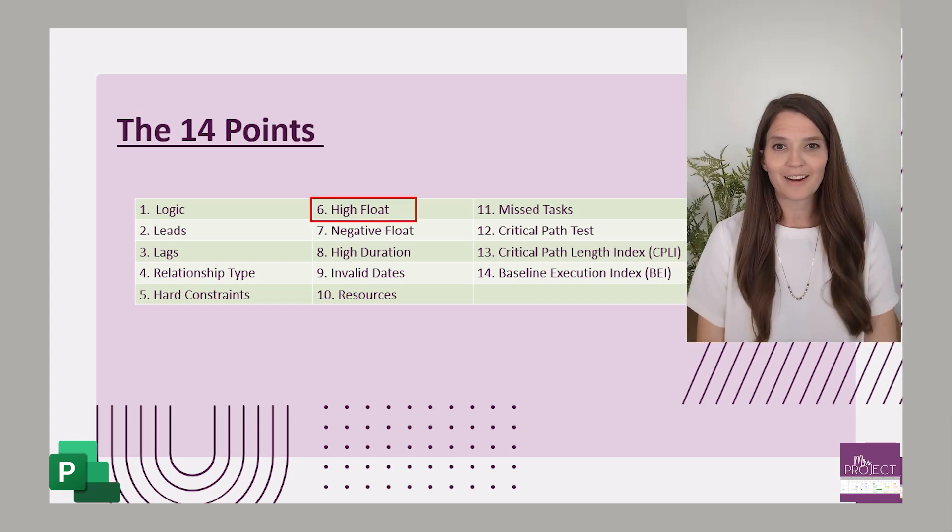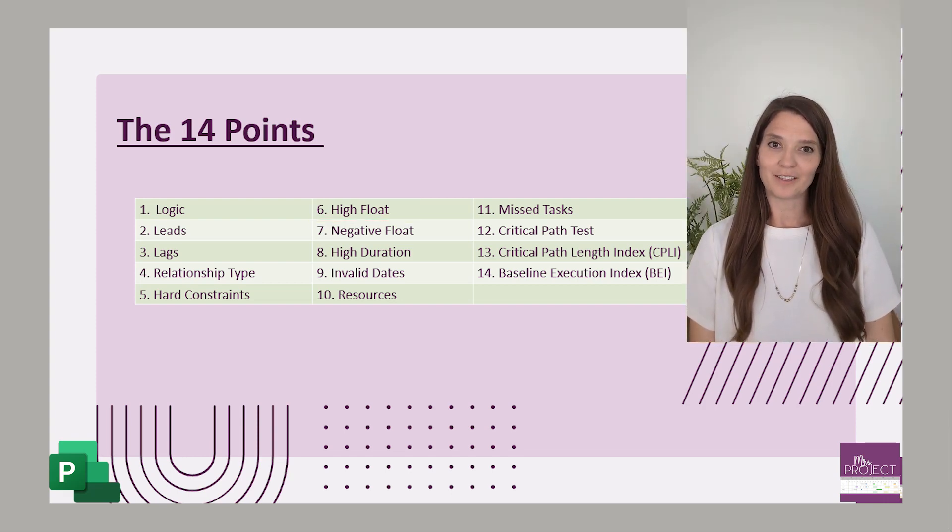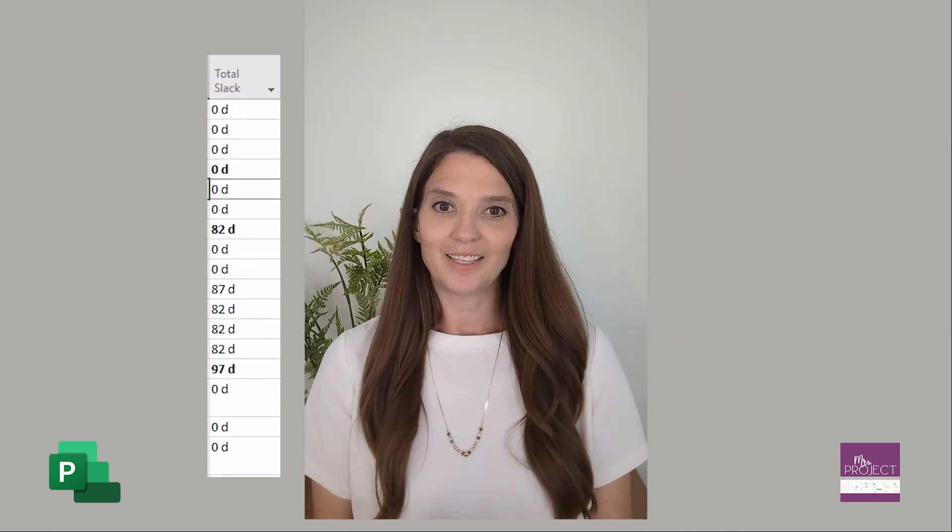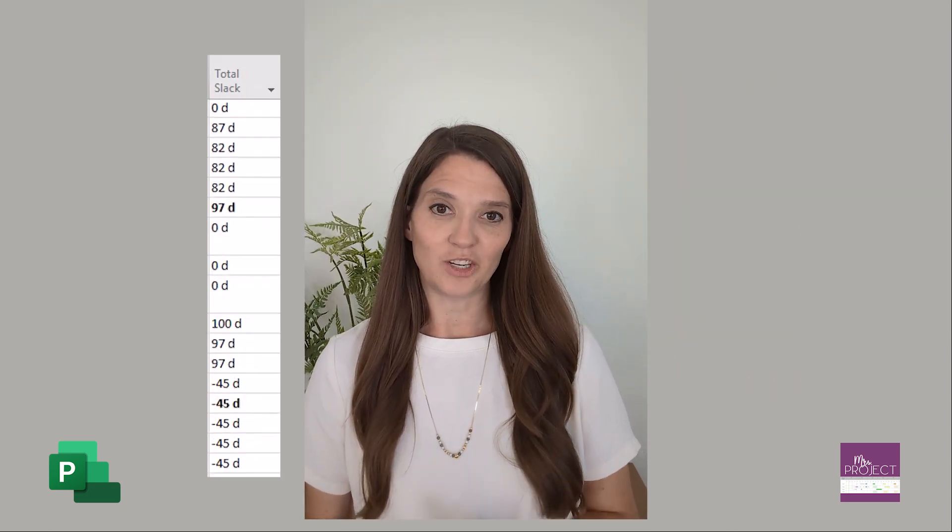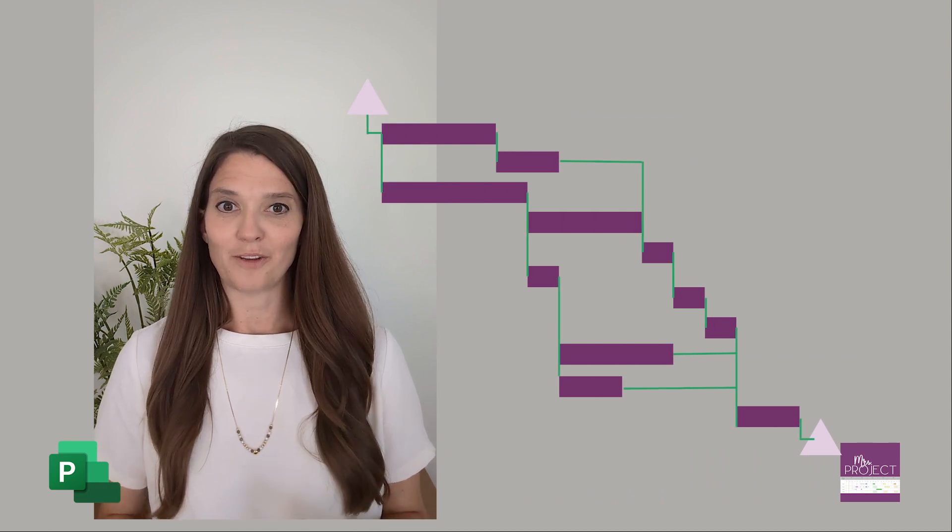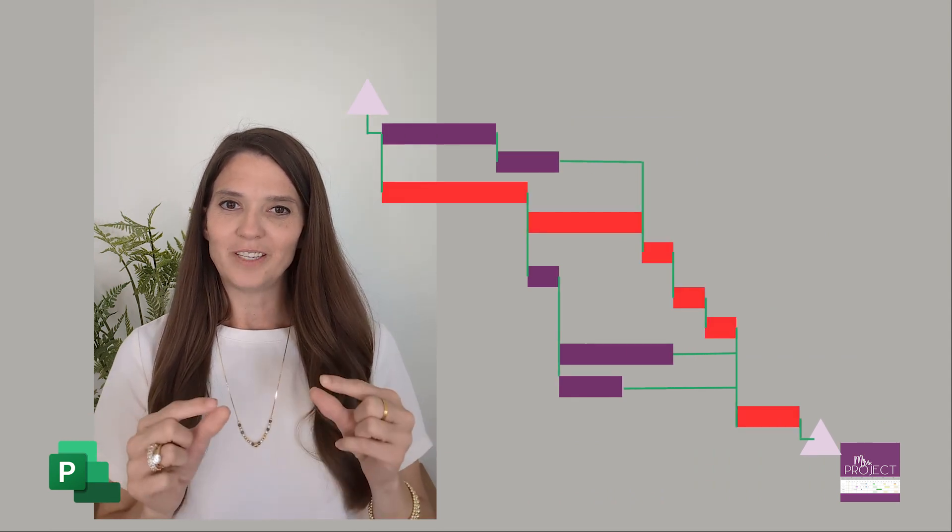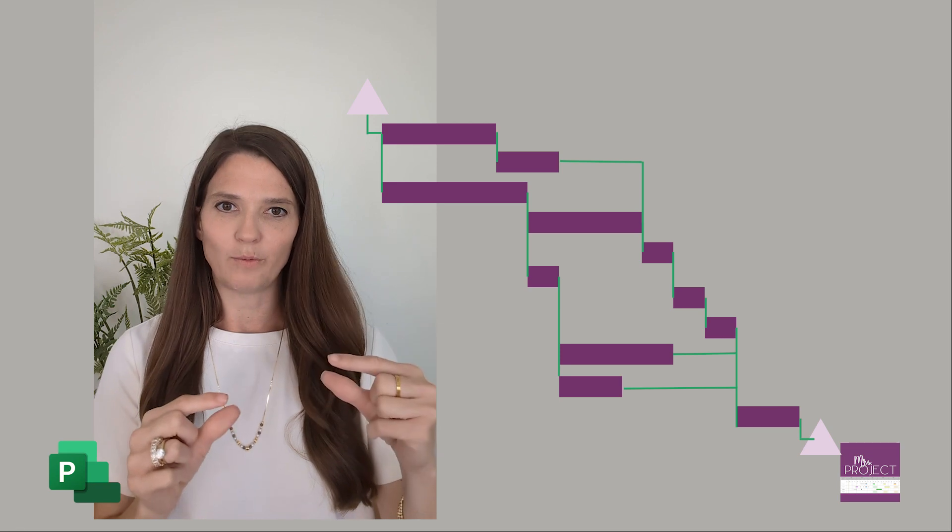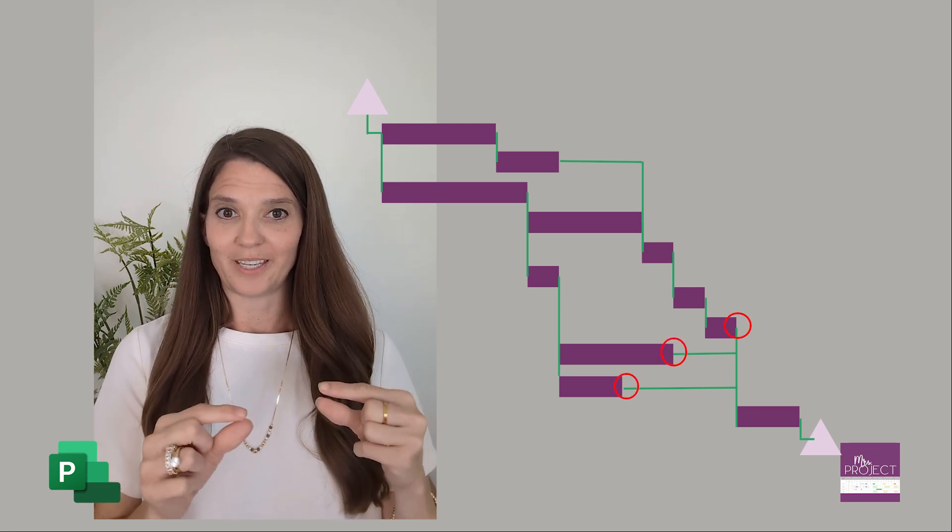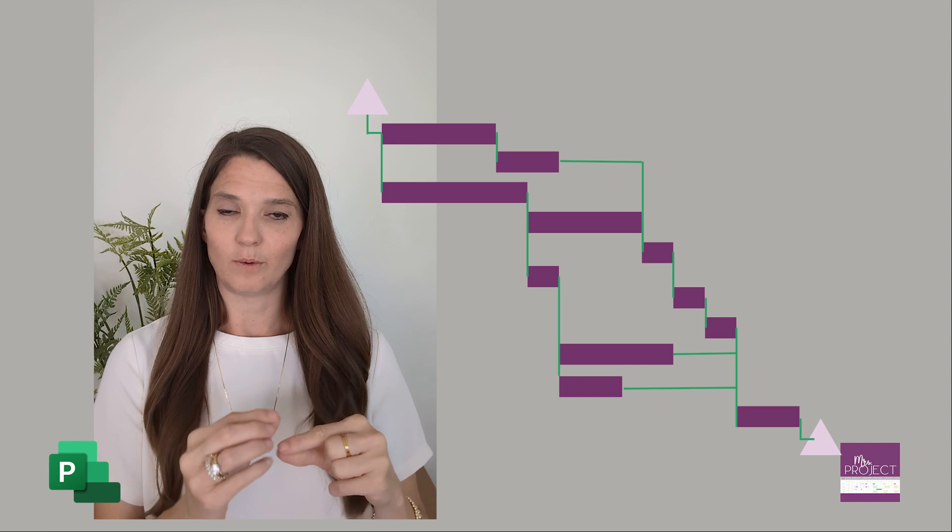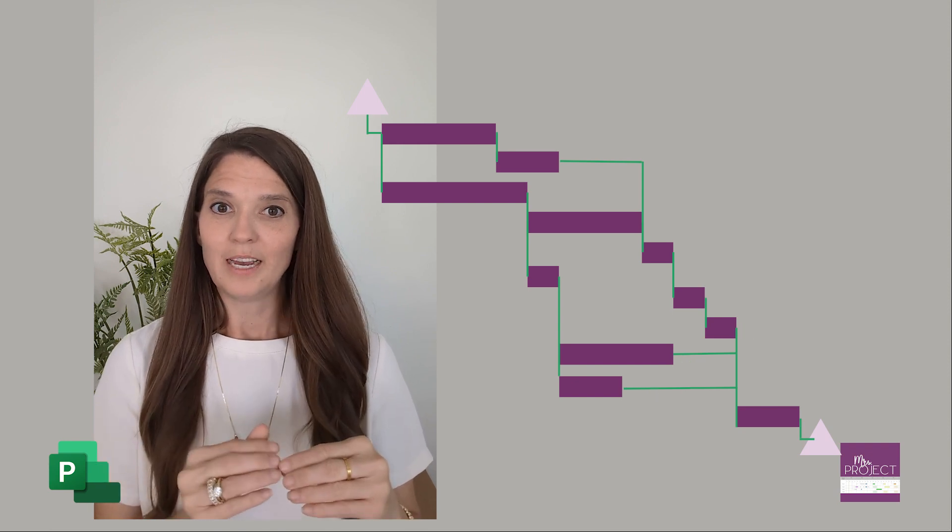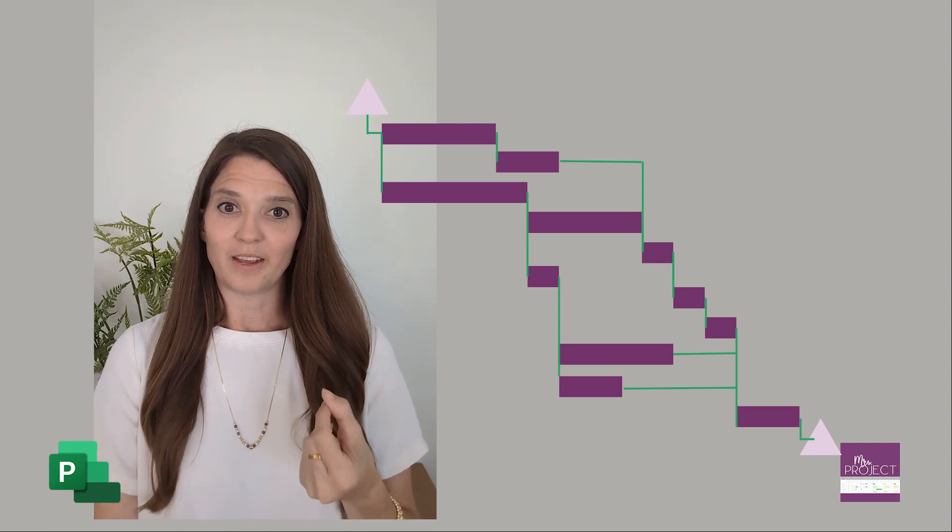Total float is another 14-point assessment and what it's looking at is the field called total slack. This column is created and calculated based on your relationships. If there's zero float, that's how you find the critical path. But if you definitely have more than one predecessor or successor to a task, you're gonna have some kind of float in there because one will be the driver, one will not. So there might be some float in there.